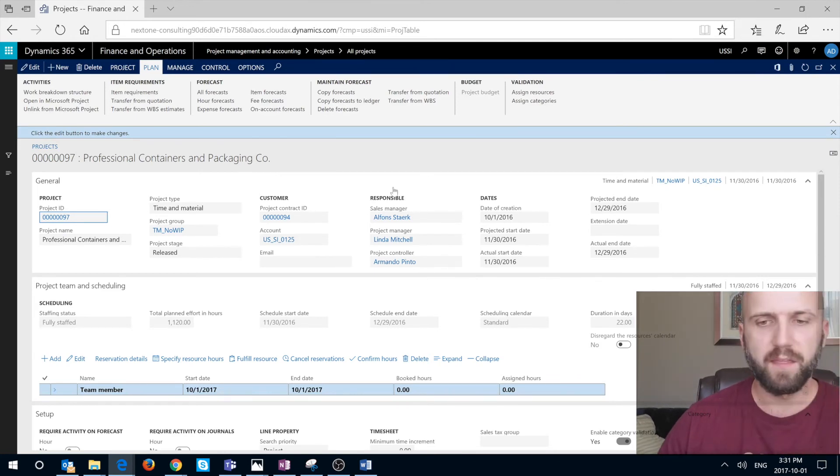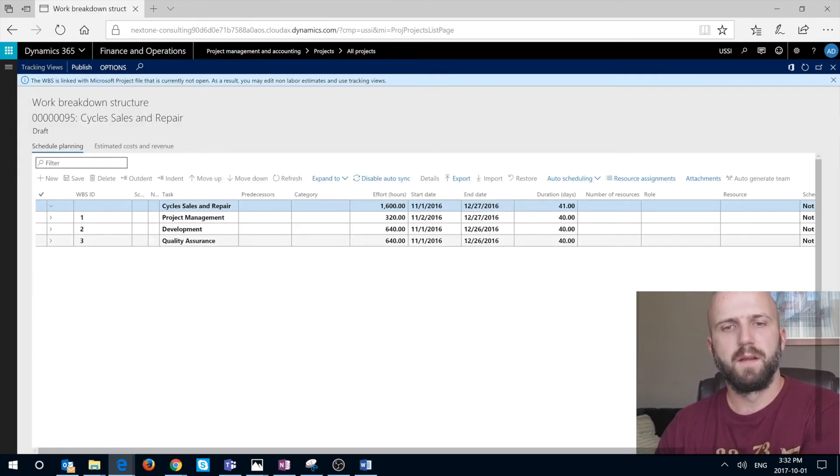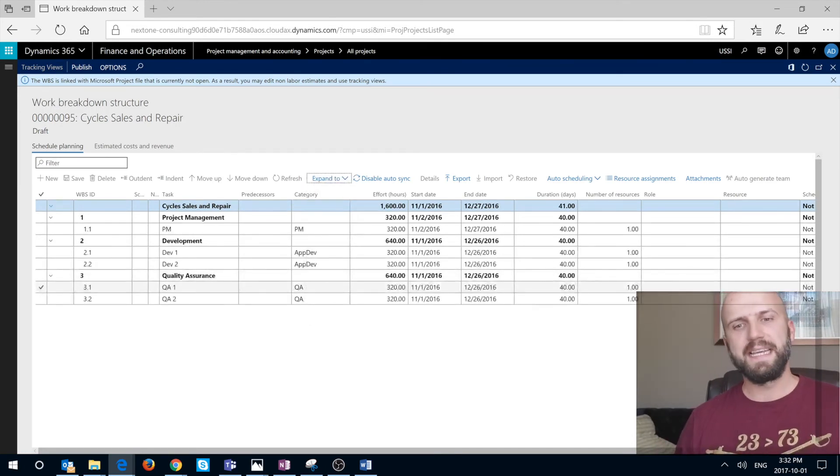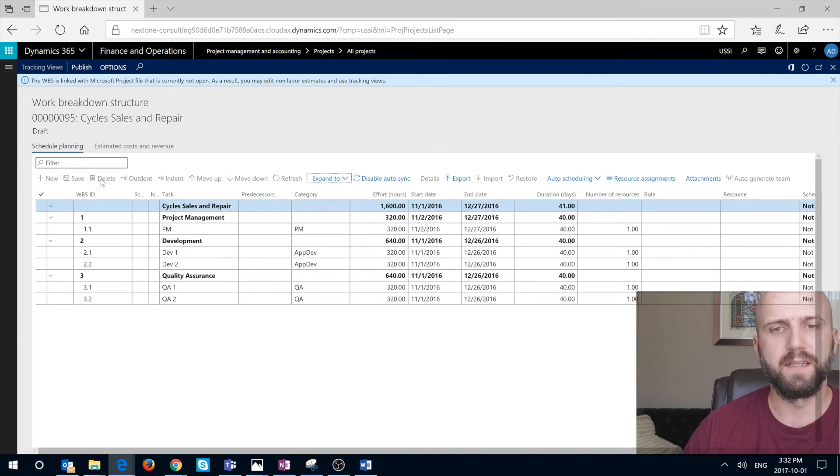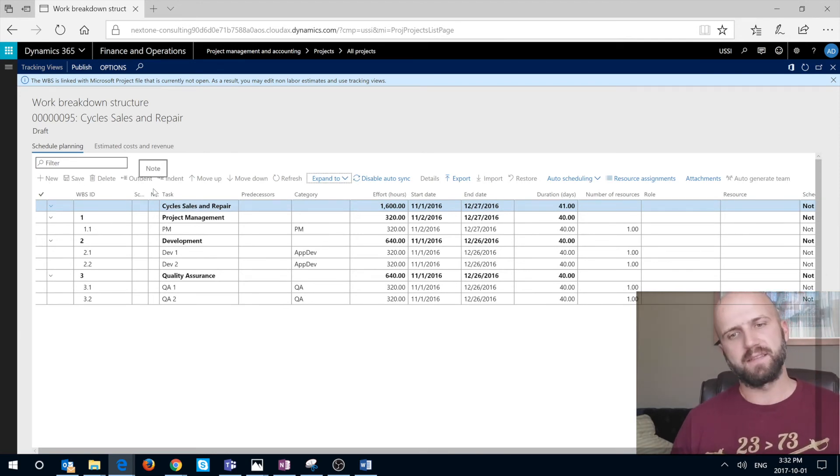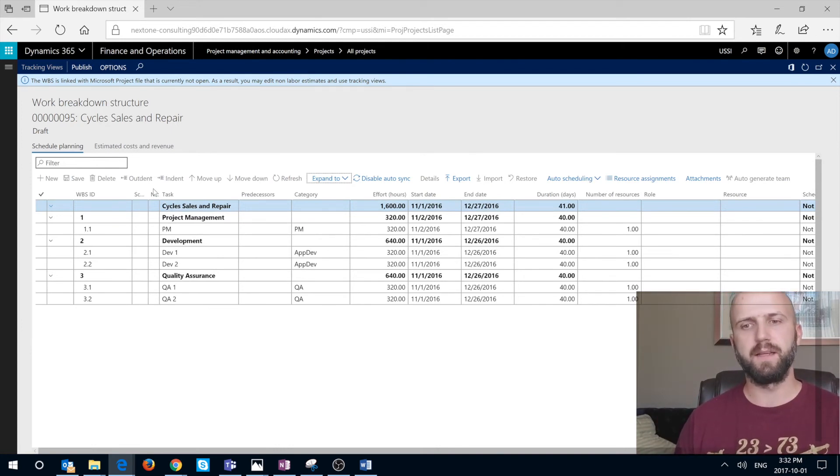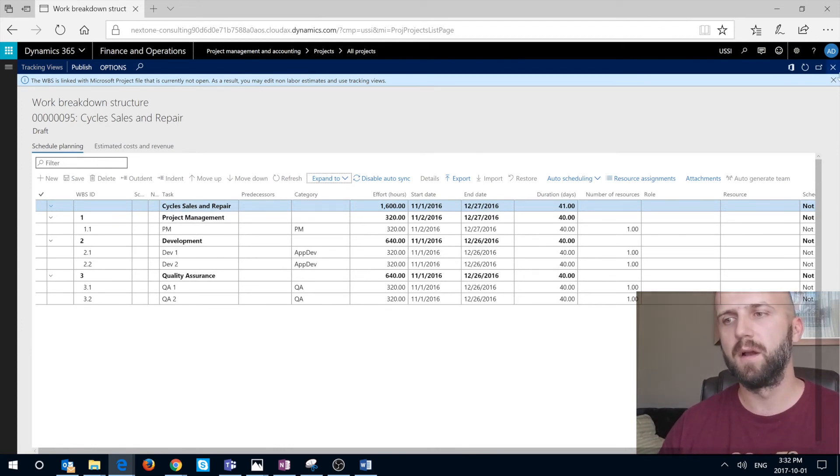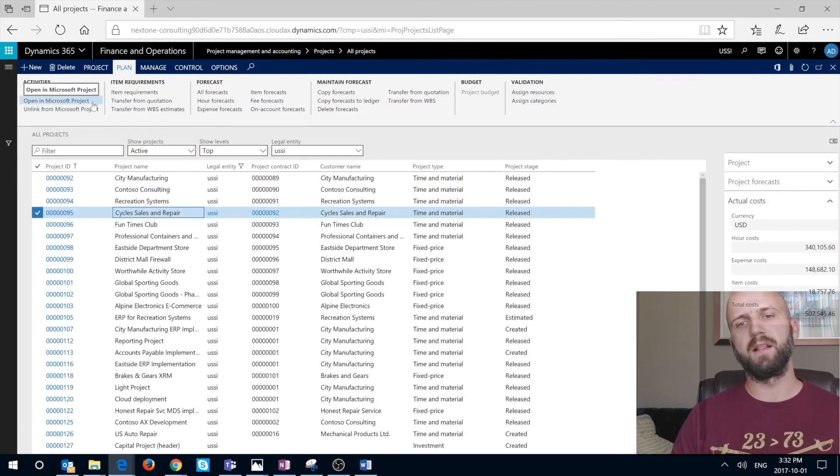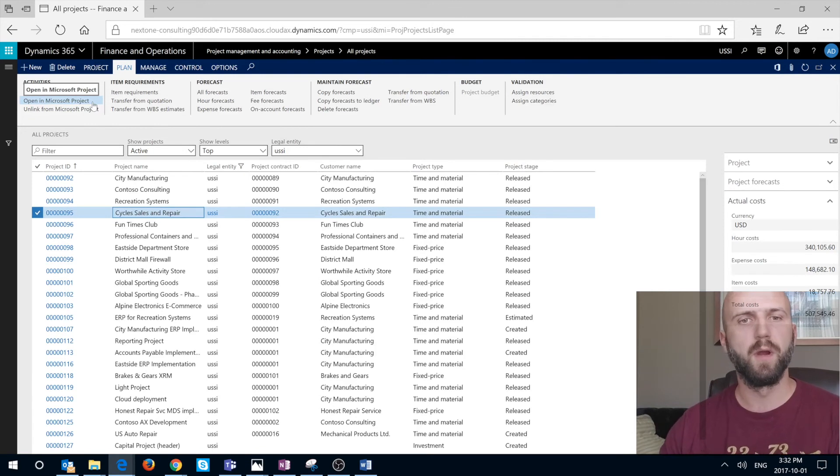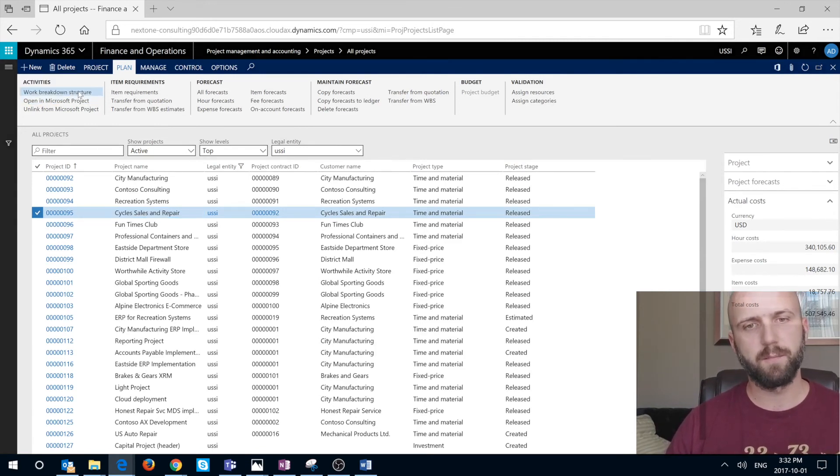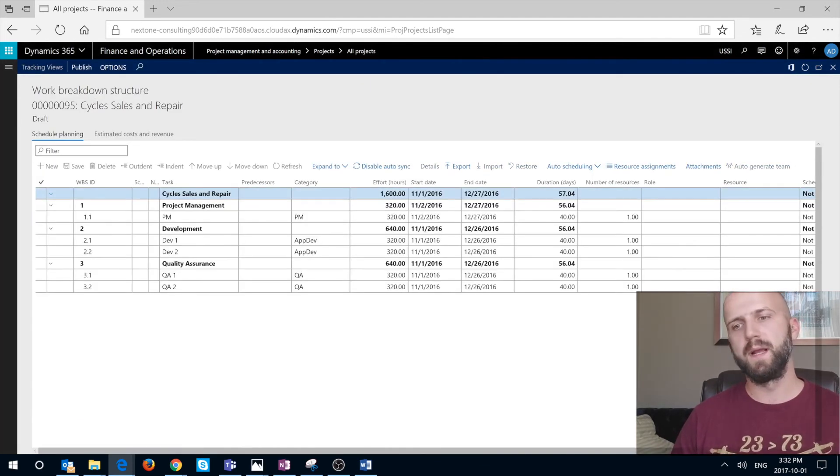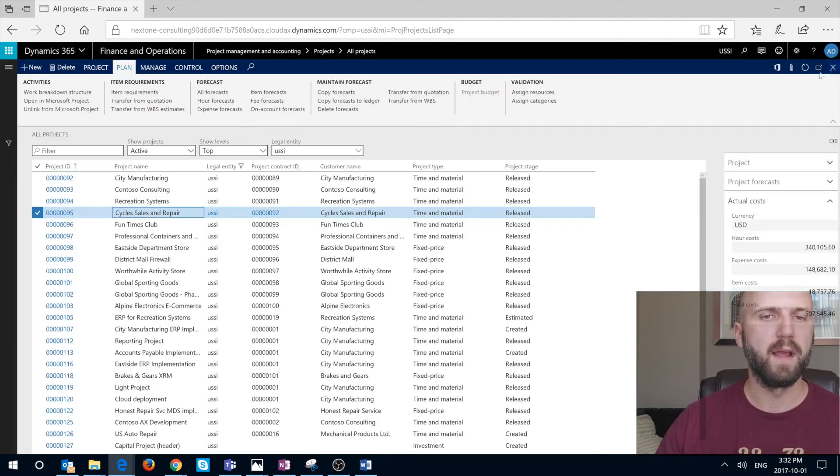A few other things that I would like to mention here is you can open that work breakdown structure. You can see it, but you notice that you cannot add or delete or save any new task in that work breakdown structure, because right now the control of that structure is entirely in Microsoft Project client. Because we need to click on the open in Microsoft Project and that's where we can do all changes. If that project is linked to Microsoft Project, we can only view the structure. We cannot modify it in Dynamics 365.